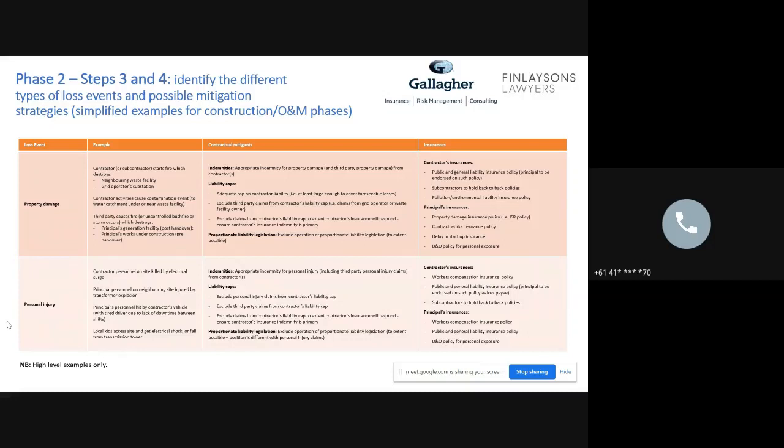And one thing that they will try and do is to put a cap on what their liability might be for any type of property damage or personal injury. It's a matter of assessing your project and what cap you might be prepared to agree to on that contractor's liability, considering in particular what losses you could possibly envisage if property damage occurred which delayed your construction significantly, or resulted in the need to do reworks because a fire or something or other means that what was a 60% complete job is now back to 10%.